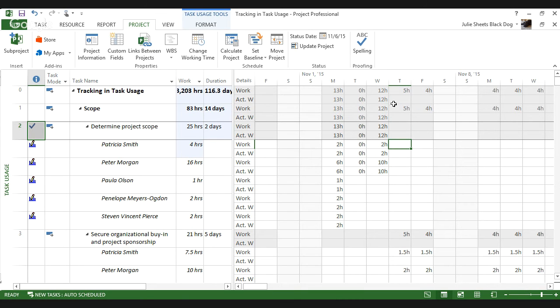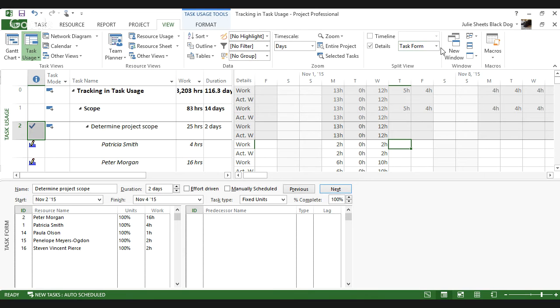And of course, when I deleted it out, I changed the finish date of the task. And because the finish date of that task changed, its successor also moved forward. So even though I can't see my Gantt chart normally from this view, I am going to go ahead and just turn it on for a second.